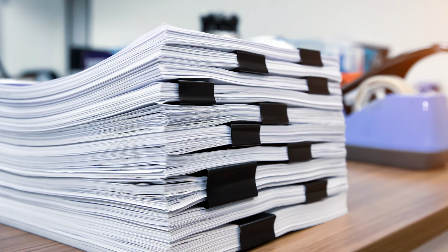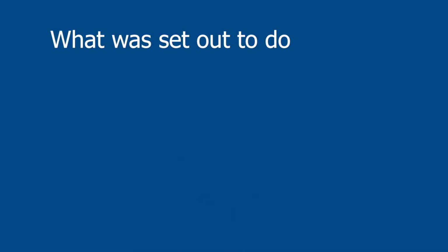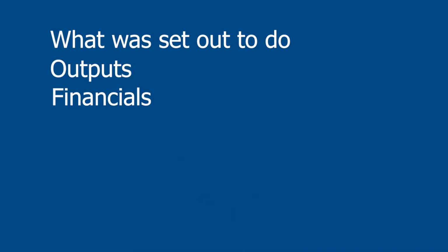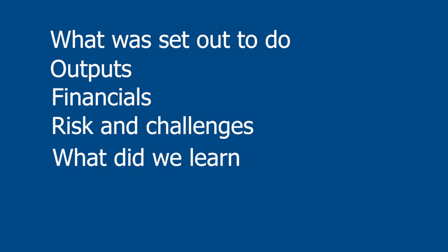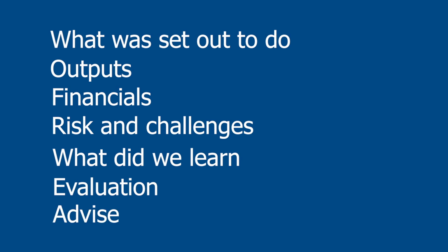One of the last deliverables for the project manager is the close-out report. And what all goes into that report? Again, what did you set out to do? The outputs, the financials, the risks and challenges. What did we learn out of this? Our evaluation. And what advice would you give to people that want to try this type of thing in future?